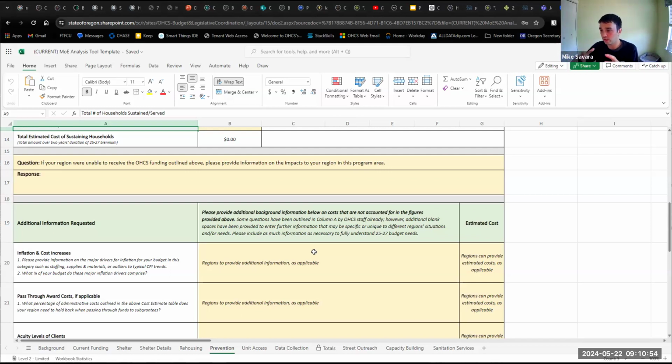Then we're going to look at the overall amount of different cost categories. For example, staffing inflation may increase higher than goods. So we want to look at it in aggregate: if 60% of our budget is staffing, we need to apply what economists think will be the staffing inflation cost to that 60%. If 40% of our budget is goods, we think it's going to be based on the consumer price index for that 40%.